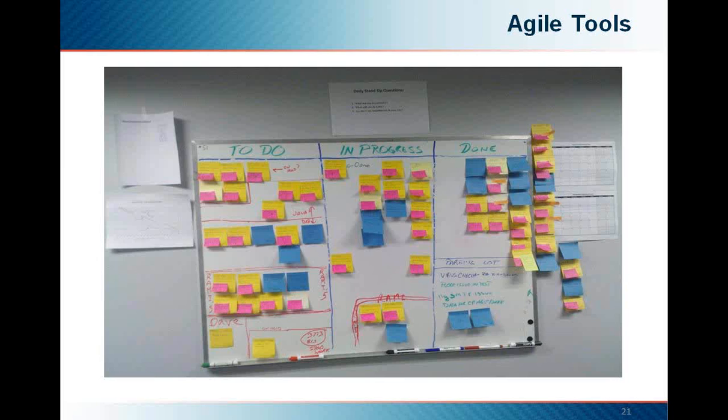We track the progress of the tasks simply by moving the tasks across the board. These are done by the individual team members, usually during the daily stand-up. The final category indicates items that have been completed and tested. The information on the Kanban board can differ between the projects. Here, the yellow tasks are planned tasks. The blue are actually new items that the team needed to focus on.